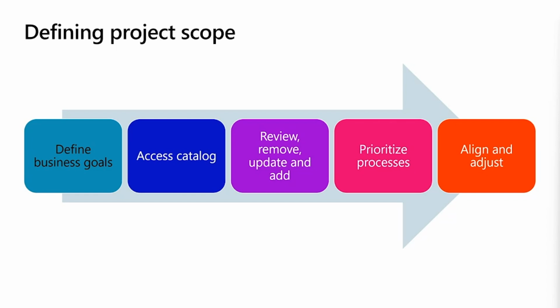It's important that you put this catalog somewhere where everyone can collaborate on it, and that you set a framework for how people will update and make changes to it. Make sure the permissions and security are set correctly, whether it's just an Excel file on a shared drive, or you put it directly into SharePoint, or perhaps you upload the catalog directly into Azure DevOps and use Azure DevOps to manage it, or a business process modeling tool.